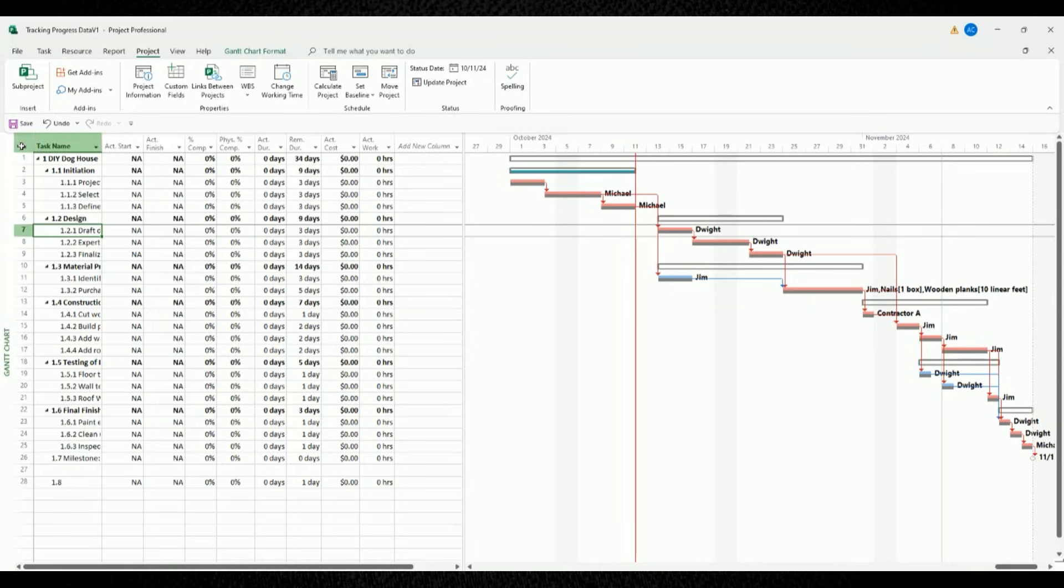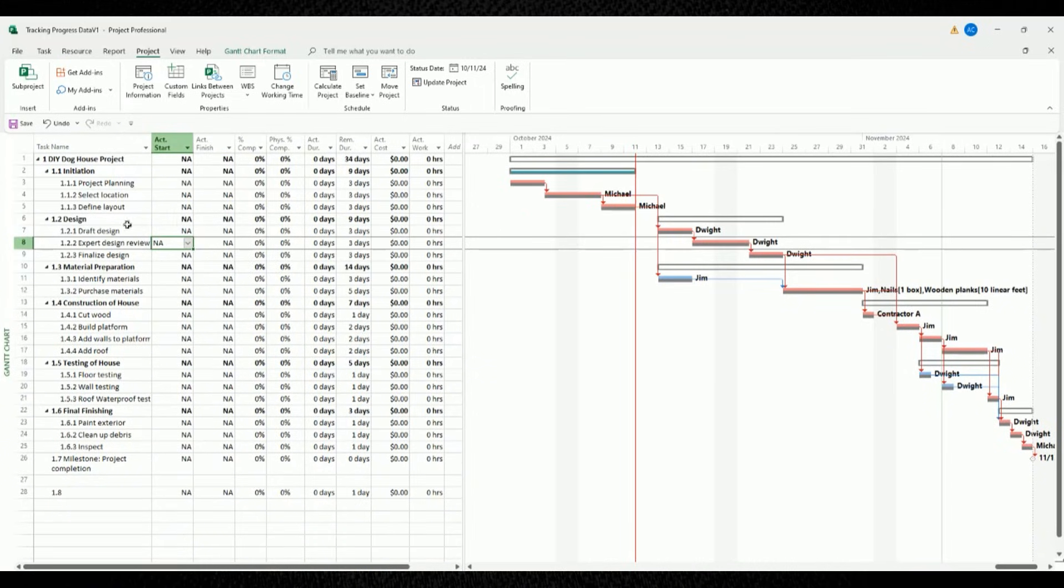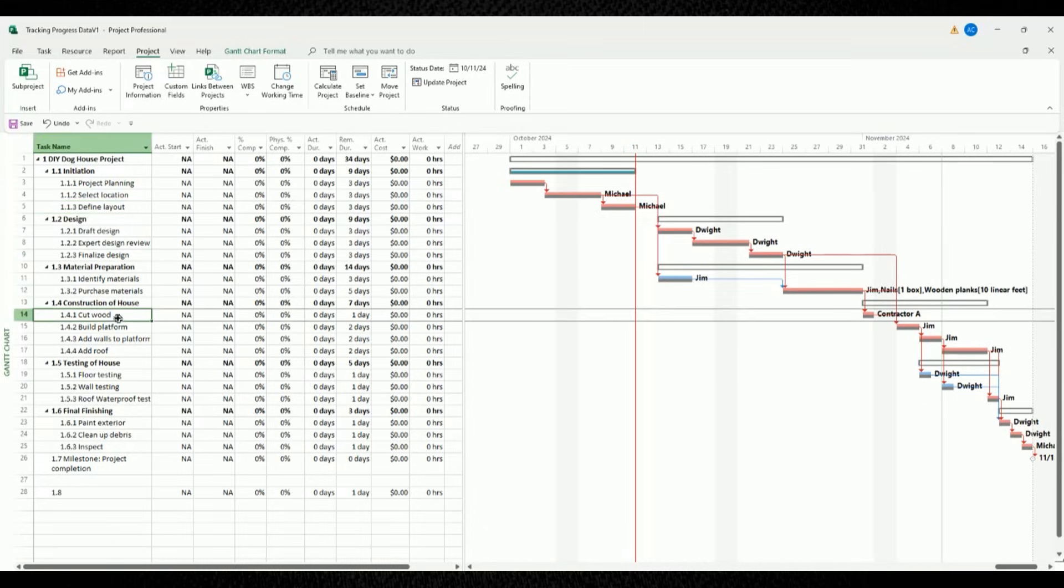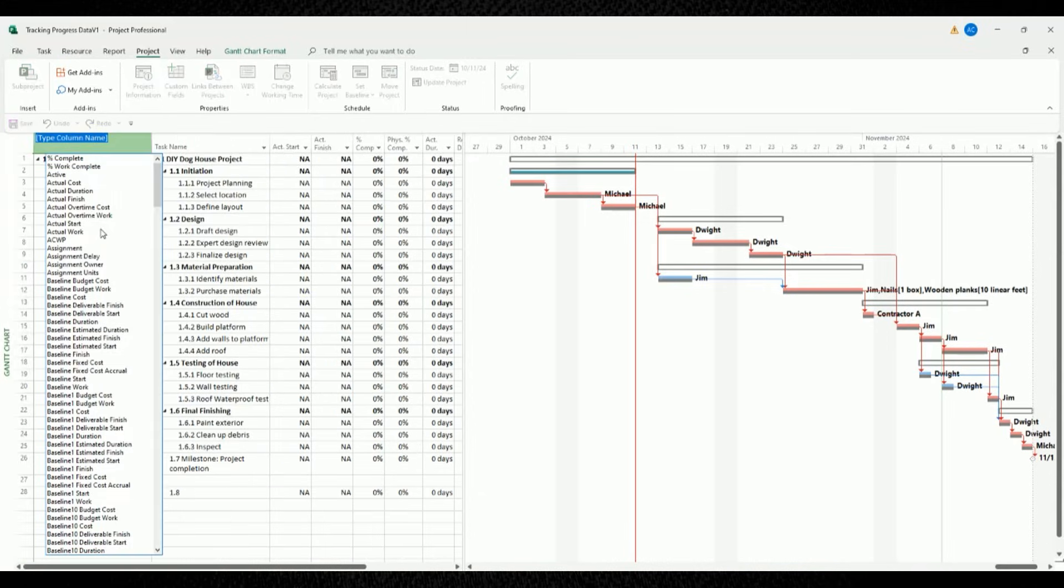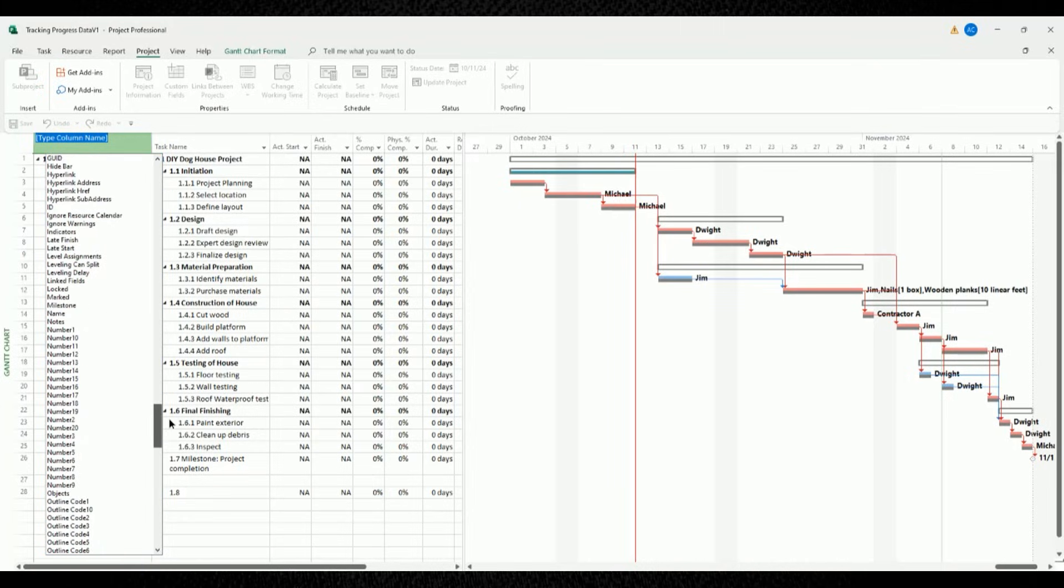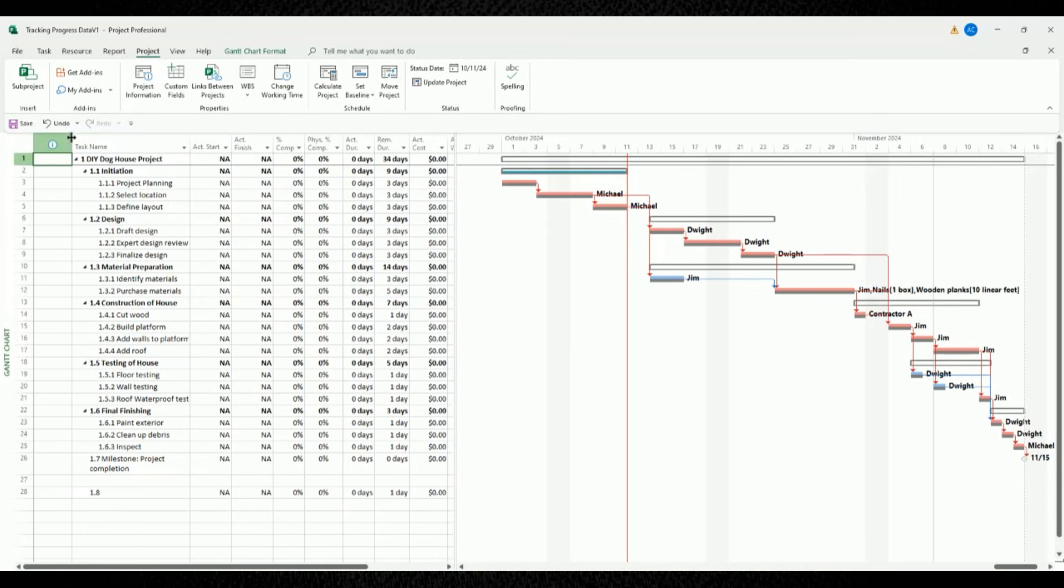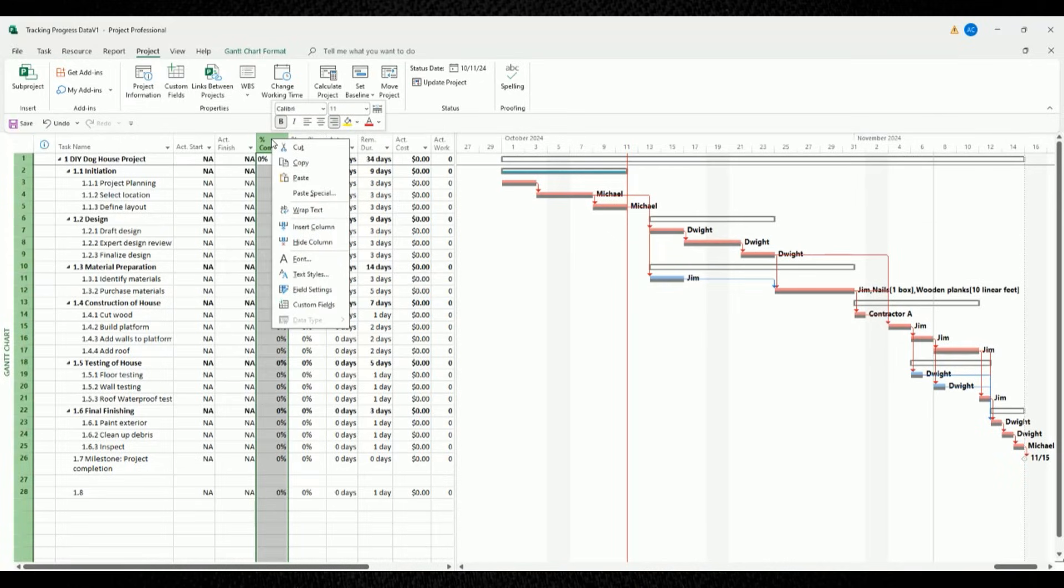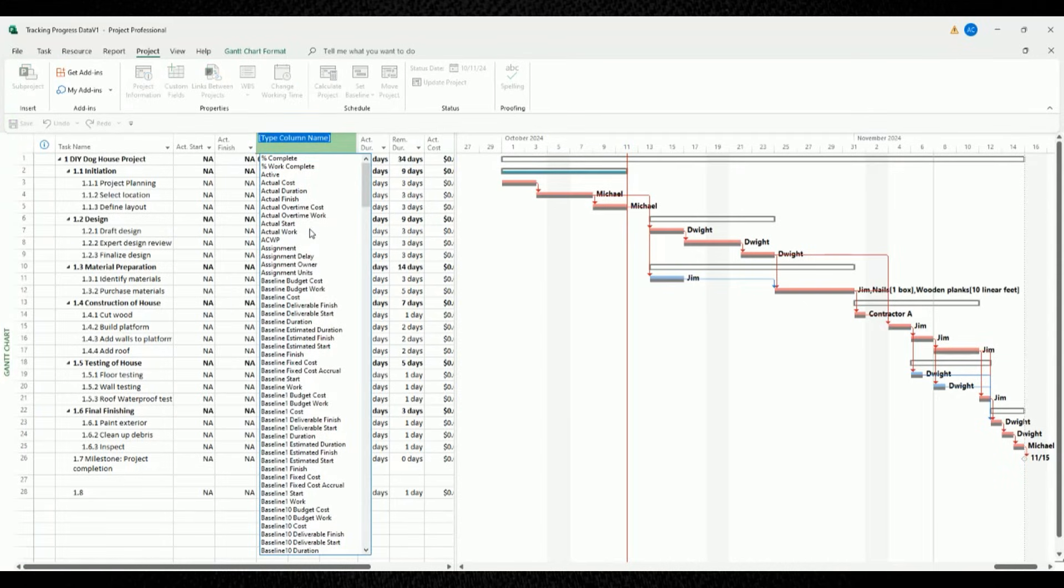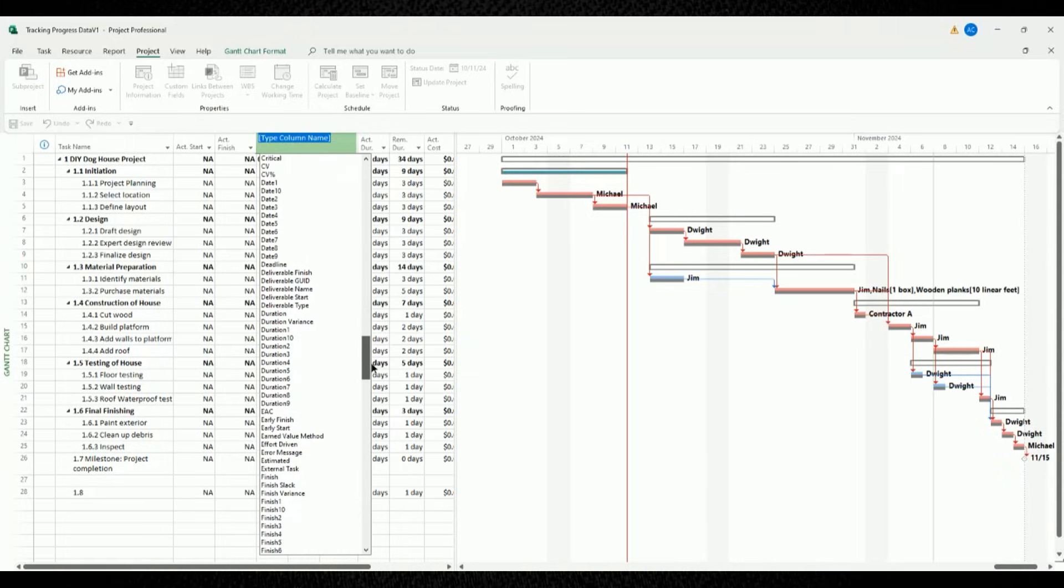To help us better visualize the changes that we're updating to our project's tasks, let's add in two columns to our table. The first column to add is for indicators, so we'll know if an issue happens when we're updating our schedule. To do that, right-click the column for task name, and then select the option for insert column. Inside that dropdown, choose the option for indicators. Now, the second column to add is for duration, so we can see how long each task will take. Right-click the column for percent completion and choose the option for insert column. And in that dropdown menu, look for and choose the option that says duration.